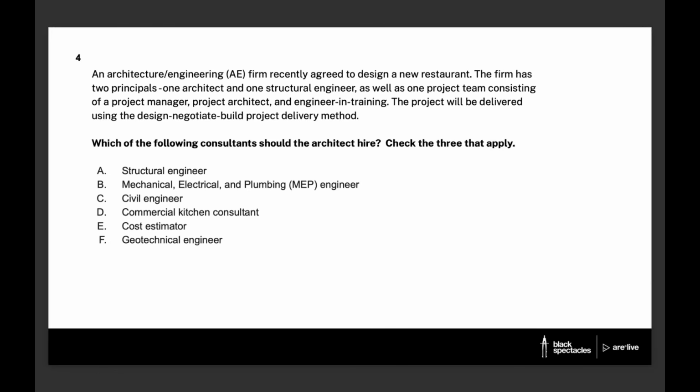All right, so we've got two correct, or we think correct answers, and we're going to look at choice E, the cost estimator. So architects need to provide estimates of the cost of the work at the end of each design phase. Large firms might have this capability in-house. This is, again, a small firm. I think it's 5 people if I counted correctly, so probably don't have that experience in-house, that capability in-house.